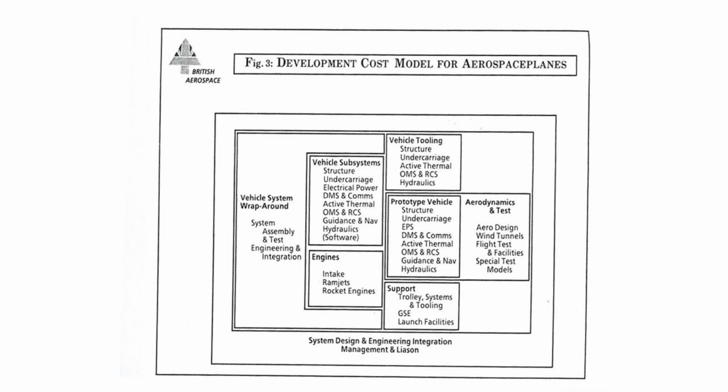These wraparound costs are not insignificant. On a spacecraft project, the wraparounds on production costs can be as much as 1/3 of the total, and for a new development account for even more.